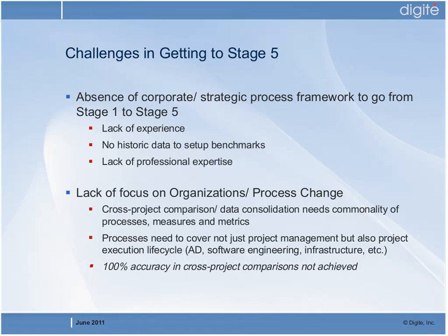Secondly, there is no historical data, because so far organizations continued operating at a project level independently. There is no historic data to set up benchmarks against which you can measure, and therefore there is an overall lack of professional expertise which is needed when you're implementing an organizational tool such as a PPM tool. That's one part, which is an overall lack of preparedness for organizational change management.